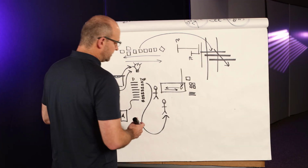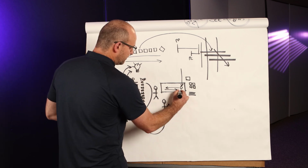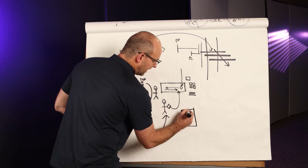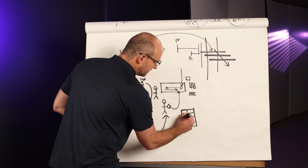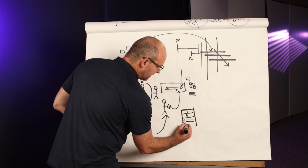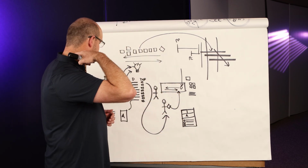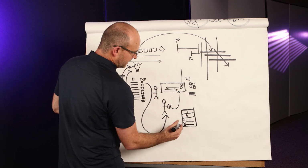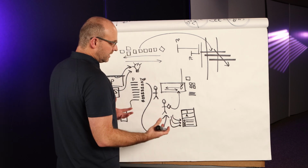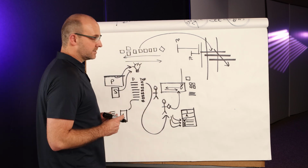What you need to be prepared to do is to take these activities and put them on a sticky and be able to put them on the board at the right time. When you put them on the board at the right time, you will have your format be where your activity is here, but you'll have little check boxes where these things that you need for this activity to be completed are required. These are your needs. And so when you get up and you put your sticky, you will ask for these items, and you will ask another trade to then put up the stickies that satisfy those. Once that happens, you will check this off, or the facilitator will do that as well.